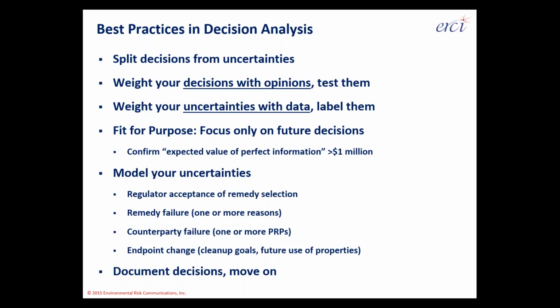Generally, it seems to be about 30% deep into the site count where the trade-offs for doing good decision analysis really stop paying off. But it's also early stage sites, high dollar sites. That's generally just a rule of thumb. You're always going to have those new emergent projects or the new strategic transactions which draw attention over to different ways of looking at liabilities.